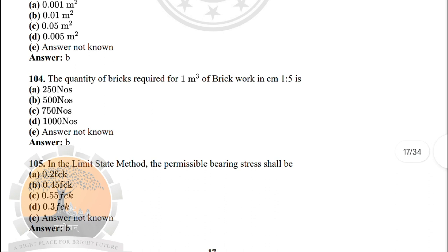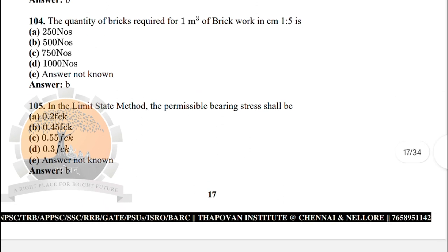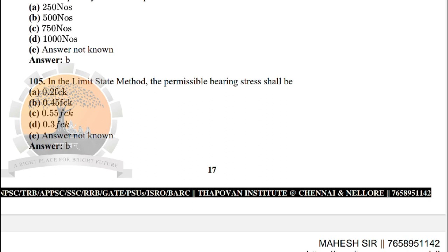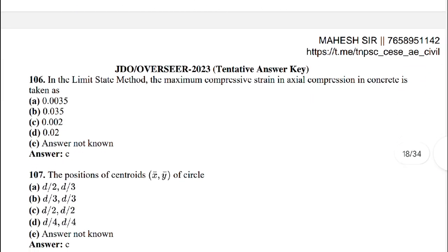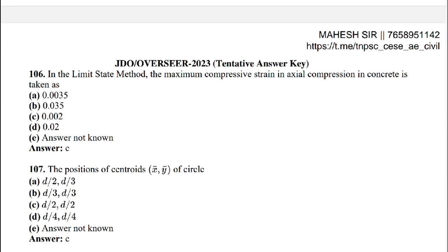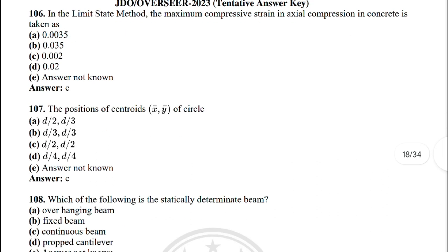Next: the quantity of bricks required for one m³ of brickwork in cement mortar 1:5 — the correct answer is option B: 500 numbers. In the limit state method, the permissible bearing stress shall be — option B: 0.45 fck. The maximum compressive strain in axial compression in concrete is taken as — option C: 0.002.